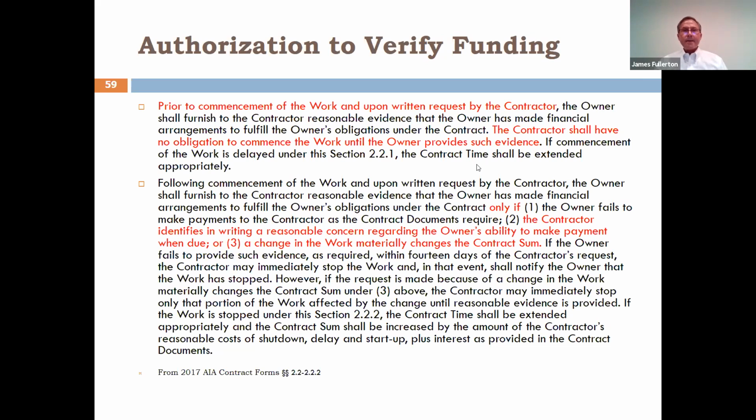Hey, Jim. This is Michelle Mucka. I just had one little question. When you were talking about the unknown physical conditions, and you were talking about the rock, are there any other examples you could give? Oh, stuff behind walls is the other one that's real common. That would be applicable in the case of any renovation, or is it an everyday problem? If you're building additions or renovations, what you're talking about is asbestos insulation. You don't know what's behind that drywall until you tear that wall down. There could be infestations, there can be water damage, whatever. In site work, rock is the most common.